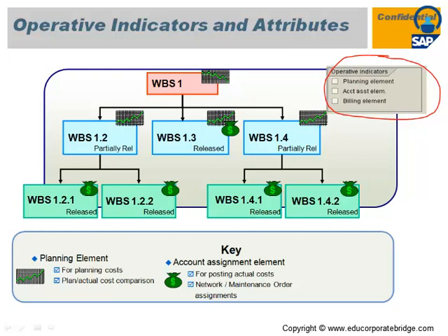The account assignment element tick is mandatory. Unless this WBS is an account assignment element, the system will not allow you to capture the cost on that particular WBS. So whenever we customize the system, by default we maintain that WBS as an account assignment element. As soon as a user creates a new WBS, that WBS is automatically ticked as an account assignment element. We have already customized that in the system, so your WBS is automatically an account assignment element.